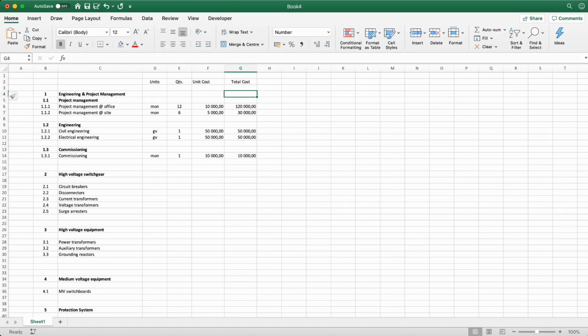One of the most critical, I think, is that it's easier for us to lose track of the lines, because sums have sums themselves. So if you have a subsum here, and then we make a sum here for this subsum and this one, this will sum both the values and the sum of those values. And if you use the subtotal, you can easily avoid this, so you don't need to worry about overlapping subtotals.